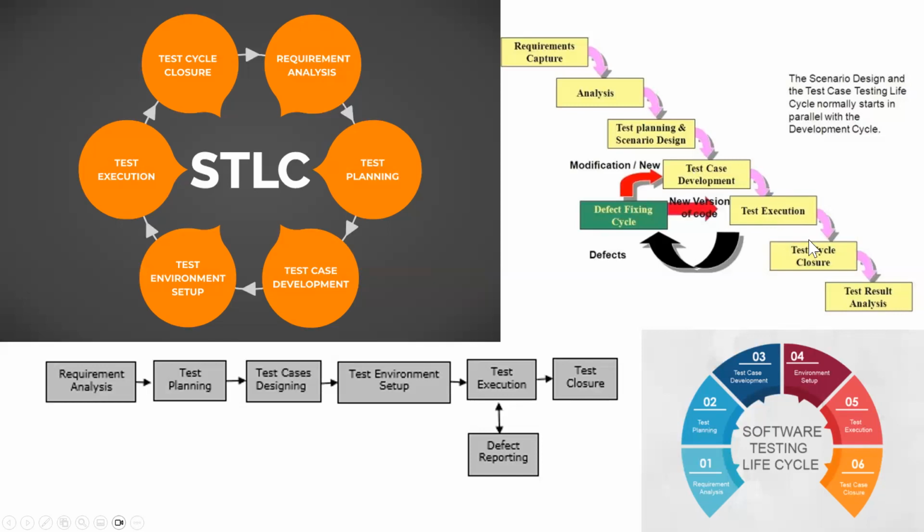Once everything is settled and everything is good, then comes the closure, the test cycle closure, where we are talking about what kind of checkmarks we need to complete regarding closing our test execution or testing cycle. What kind of result report do we need to submit? So, an exit report, so that we can exit from that testing phase, submit that exit report as a satisfaction from the testing side regarding the quality of the feature, the requirement that we tested, and then get it signed off, so that we can say this is done, this is good, at least for now.